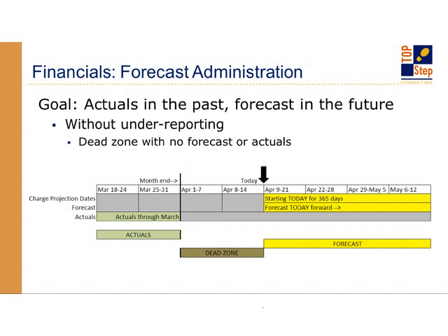But if you are just starting your forecast this week, let's say April 9th in this example, then there's this dead zone for the first 2 weeks of April where you haven't generated actual revenue through April, and you also don't have a forecast for those first 2 weeks in April, so you have a dead zone. It might not be obvious in your report, especially if it's a monthly report. You say, oh, I have actuals in March and I have a forecast in April. What you might not realize is that your forecast in April is incomplete.